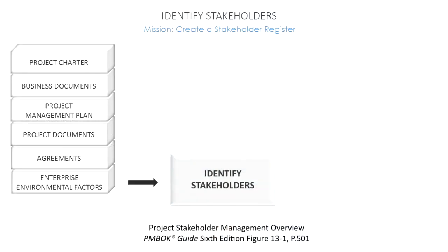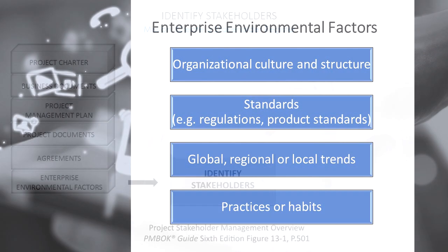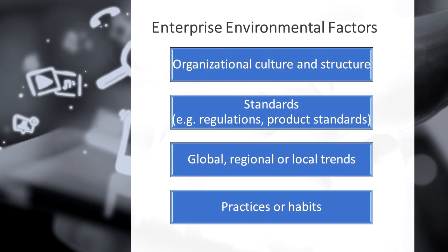Our next input is enterprise environmental factors. Enterprise environmental factors at play here could be organizational culture, political climate, government or industry standards, such as regulations, product standards and codes of conduct, global, regional or local trends, and geographic distribution of resources.